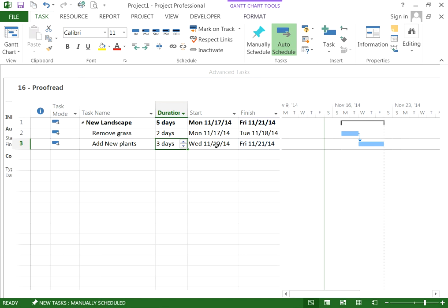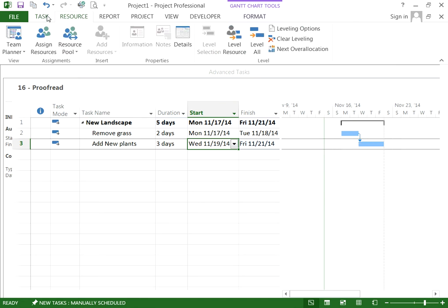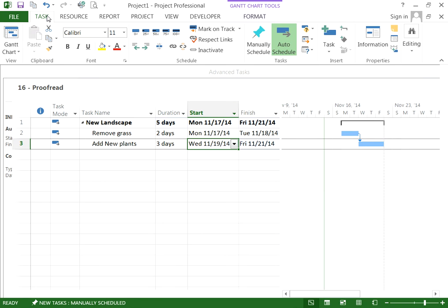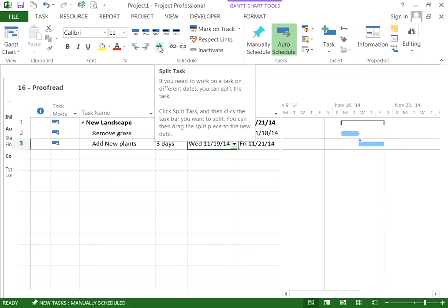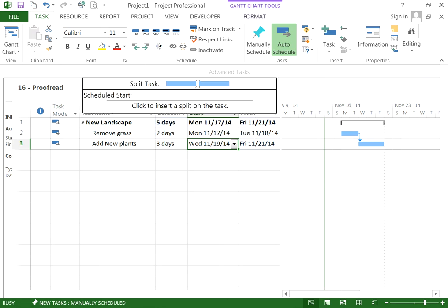The task was originally scheduled to start on November 19th. So now let's go ahead and split it. To split it, we go to the Task tab under Schedules, click on this icon, and select Split Task.